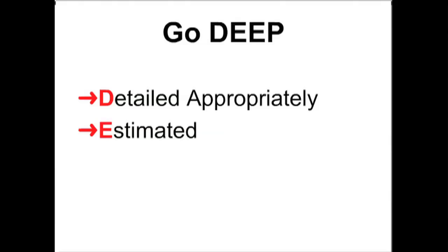Because the team is estimating it, as those are familiar with it, 13 or 20 size, that's probably a good candidate to be broken up. Is it maybe too small? It's a 1 or 0. We can now combine it together. Also, it gives a great sense when you estimate the whole backlog, as a manager, to figure out, if I have an upcoming release on this date, what can I accomplish based on my capacity and past velocity?